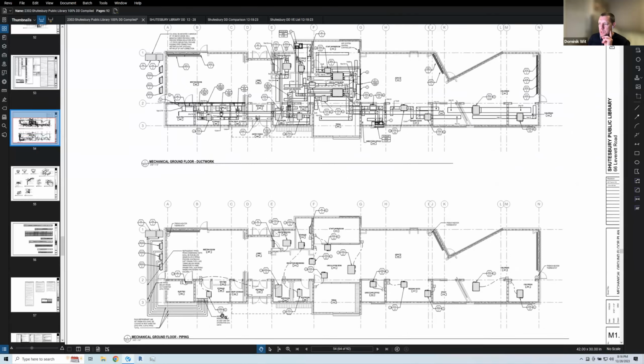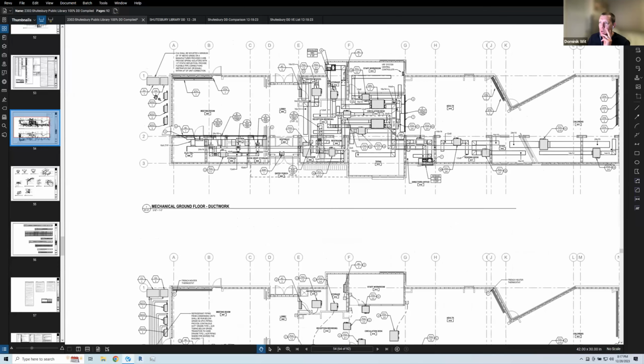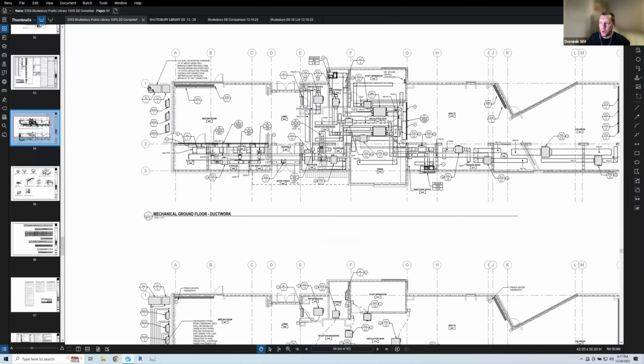A VE item was to take all these refrigerant lines that were in a duct bank going below grade into the storage room here. We would actually have them all run together along this wall and then enter the electrical room this way. But I think what Neil is really referring to is the fact that we have a bunch of mechanical equipment here. They're going to be on their own concrete pads. And we are still working to consolidate how they are located and to meet their maintenance clearance requirements, because they need certain access to certain sides.